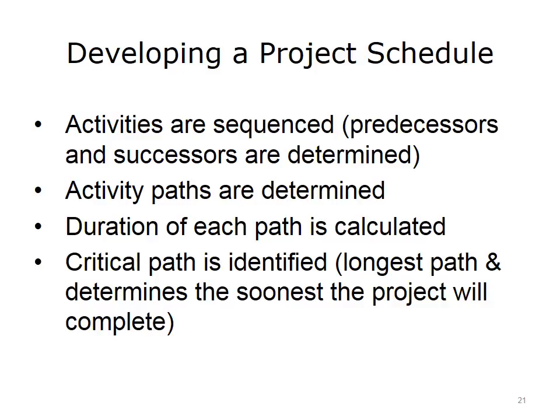The project schedule can be developed after the following activities occur: all activities are sequenced, predecessors and successors are determined, activity paths are determined, the duration of each path is calculated, and the critical path is identified. The critical path is the longest path and determines the earliest the project will complete.